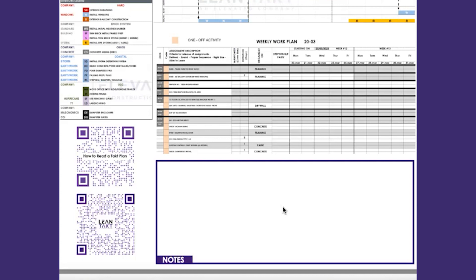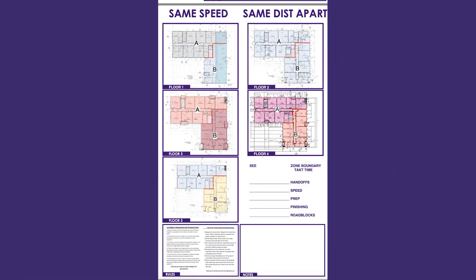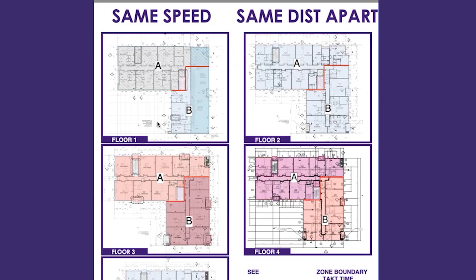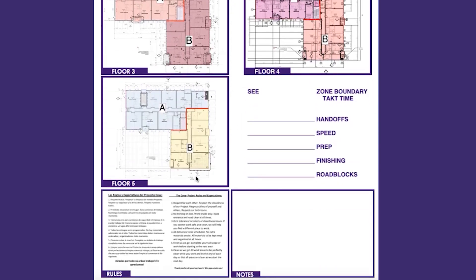There's also a second page. We're always worried about the visualization of time and space. On the front side, you have the schedule and the look-ahead to take into the field and walk the project. On the back side, you have the zones — floor one all the way to floor five — so you can visually see the locations. There are also rules to the TACT system, a place for notes, and a spot to watch for handoffs, the speed of the trades, preparation of future areas, how well they're finishing, and any roadblocks they might find.